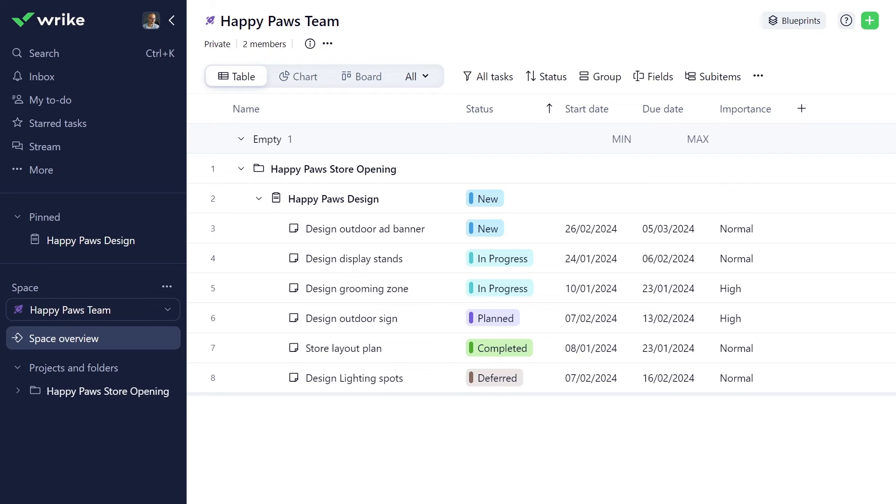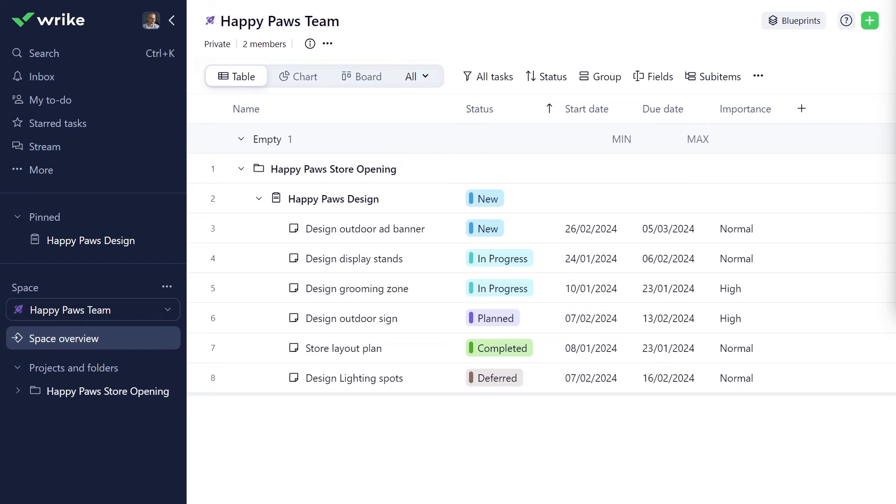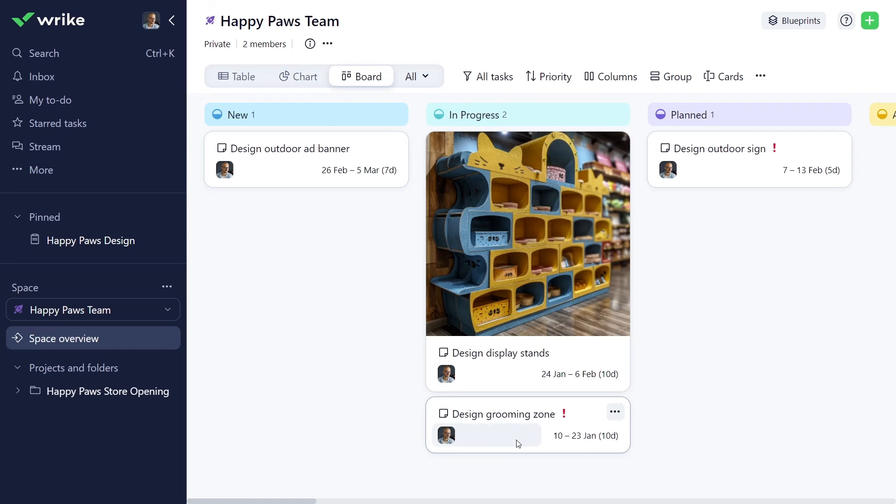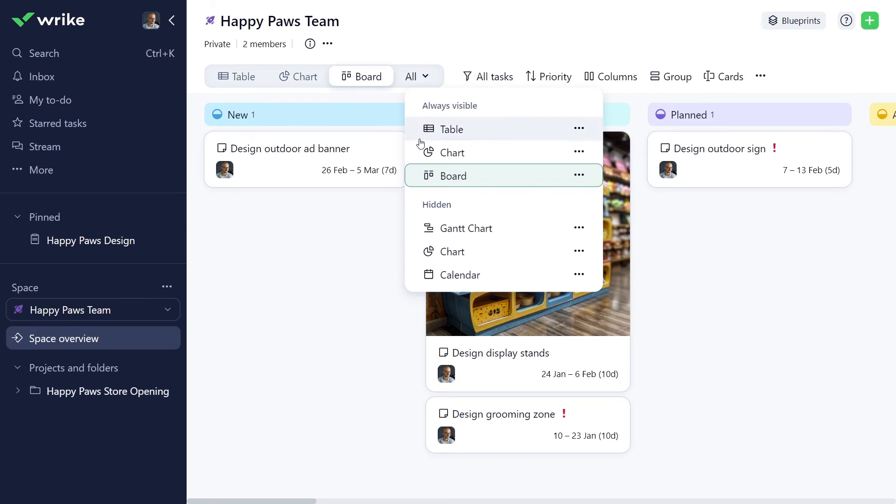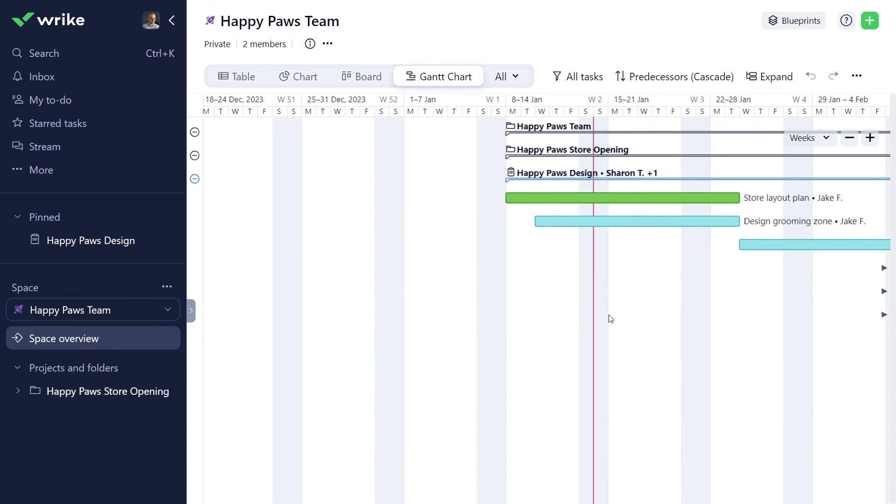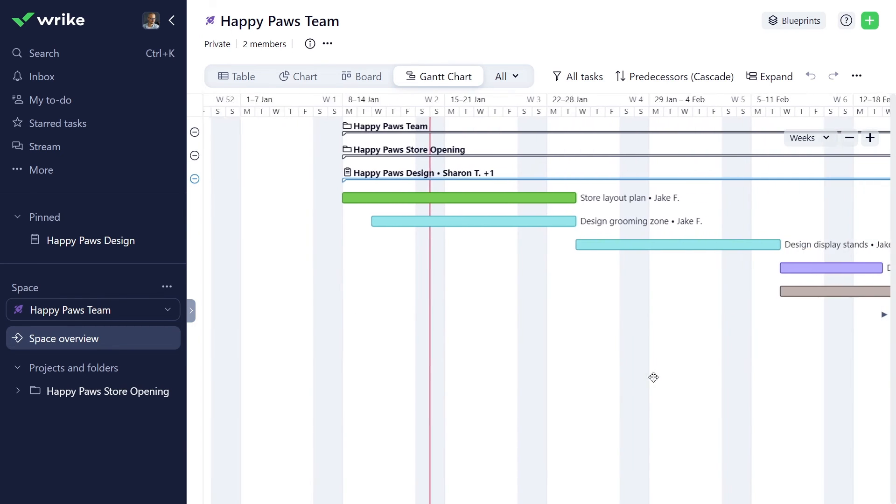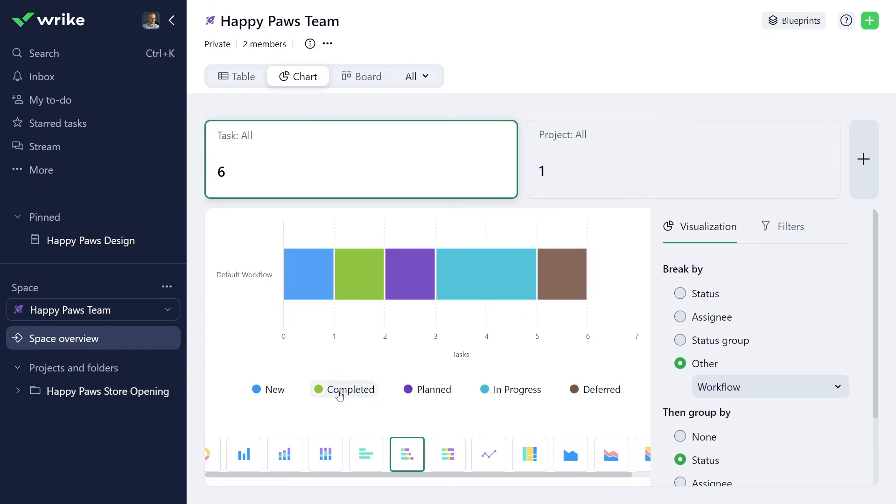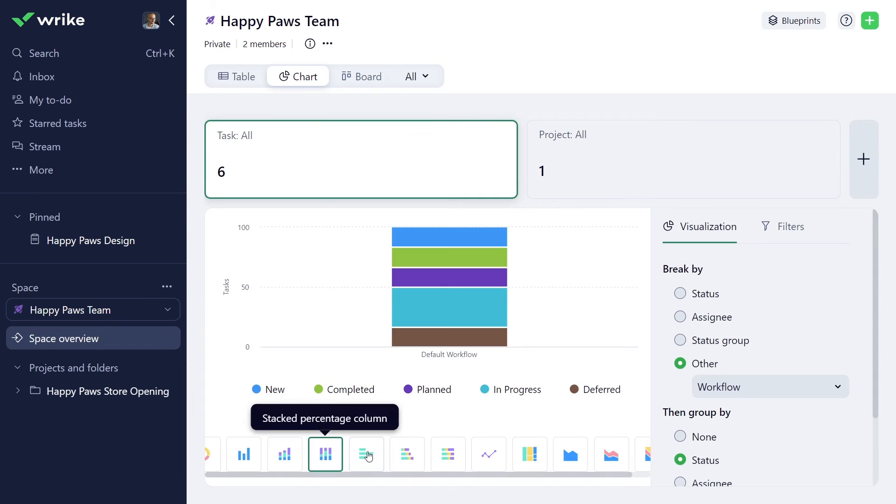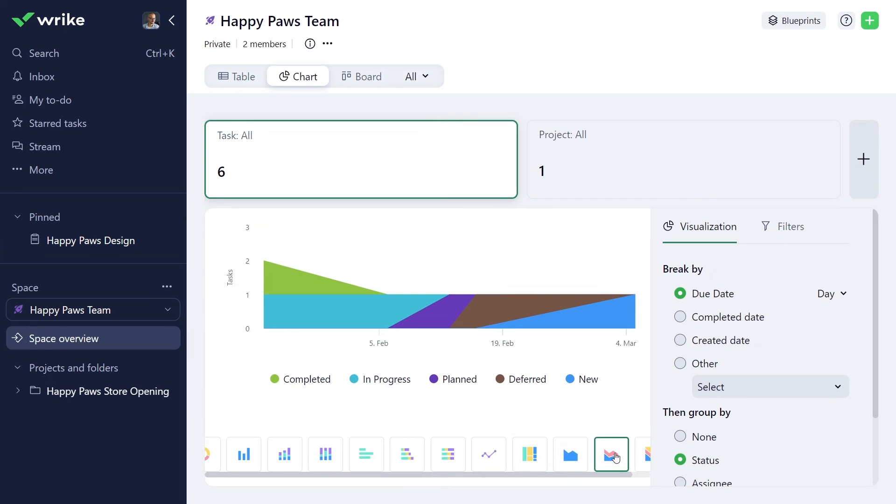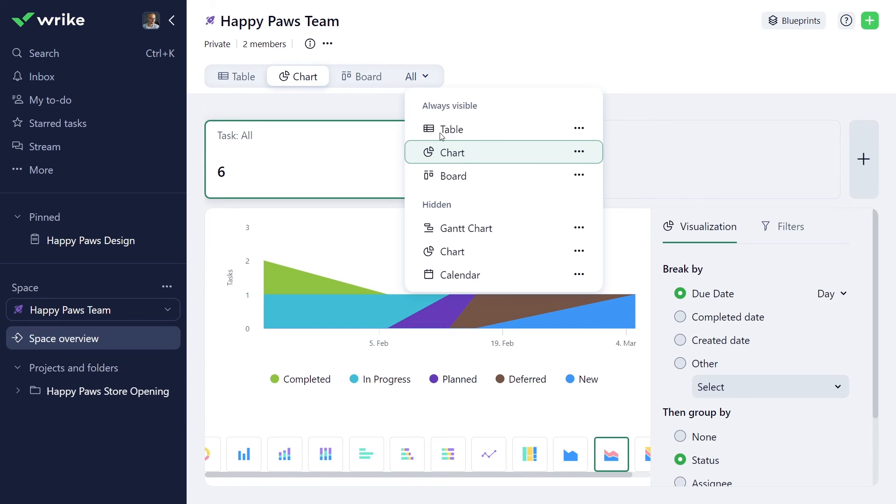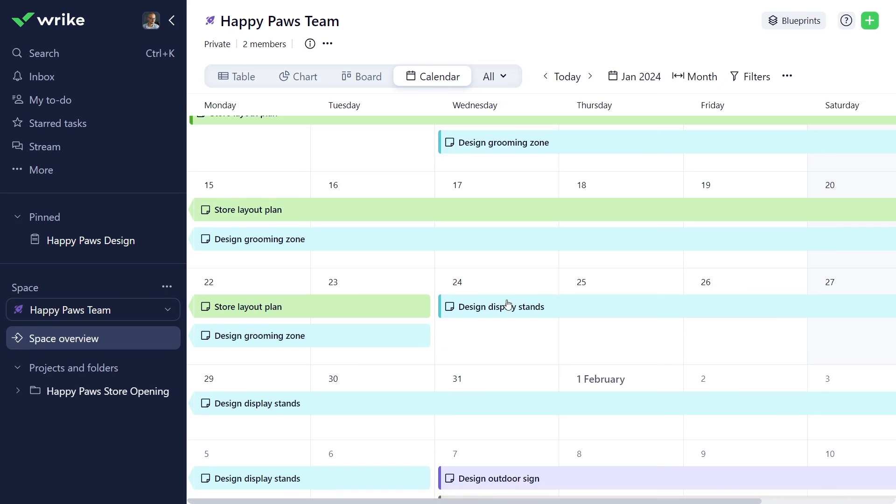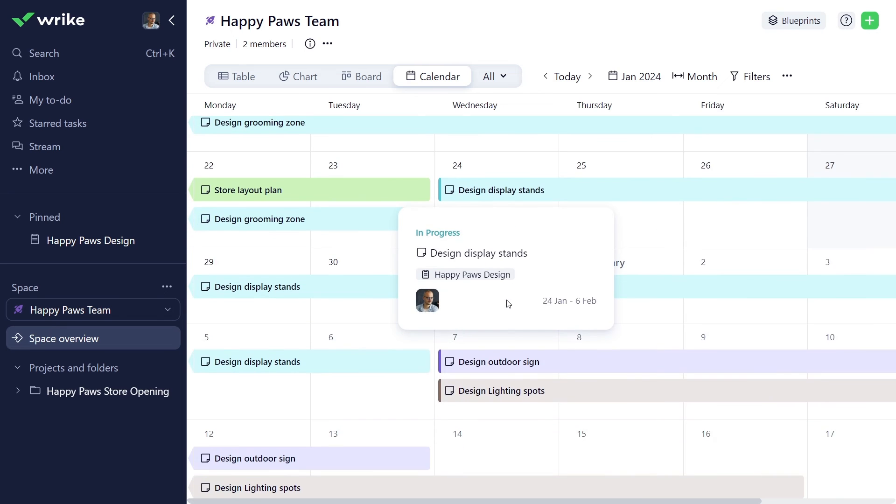Depending on the project settings enabled by the project owner, you may see additional views to help you monitor your work. Board view allows you to see task progression by status. Gantt chart gives you a bird's eye view of the project plan with all its dependencies and milestones. Chart view is a visual and user-friendly analytical solution. And calendar view displays your work items on a timeline to keep track of what needs to be worked on and when.